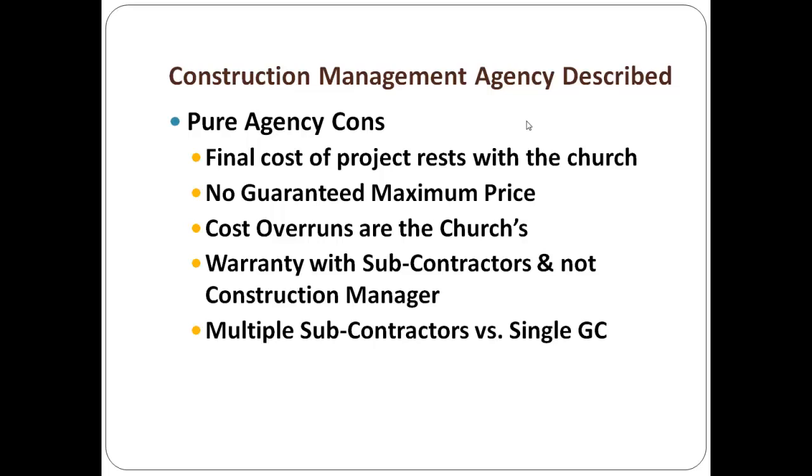The positive to that is that if you're doing the other two processes and the builder goes belly up, he goes out of business, he can't finish the project, something happens to him, your whole project is put at risk because another builder's got to come in, assume the work that the previous GC did, and finish the project. It's a nightmare. To put it simply, it's a nightmare. You don't want that happening. I don't know how often it happens, but if it does happen to you, you're unfortunate to have that happen.